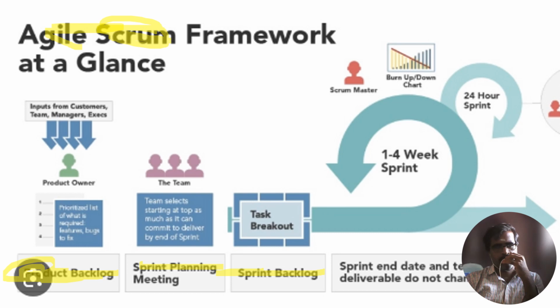The work is planned to be done in various iterations called sprints. A sprint planning meeting is held to select some of the items from the product backlog. These are put in the sprint backlog. The sprint lasts for 1 to 4 weeks, and the objective is to deliver all items from the sprint backlog. A daily Scrum meeting is held in order to track the progress.